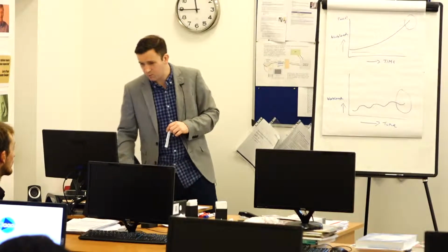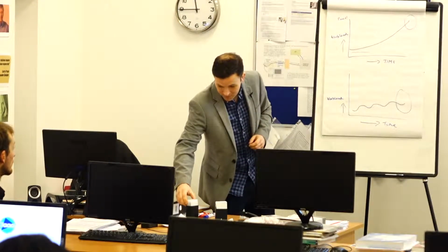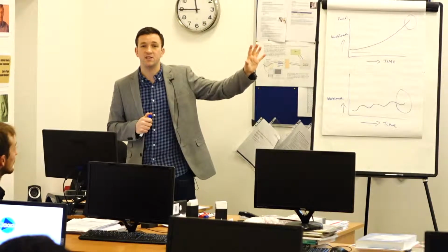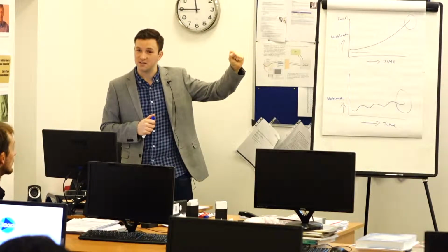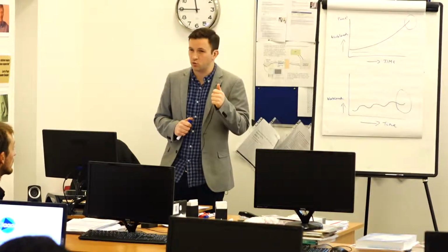So we use something called planning poker, which is actually cards, here at the front. I'll have a go at this in a second. So in planning poker, you have some data from a previous project that tells you how long a feature will take, okay? And it's got a number assigned to it. They're called story points.